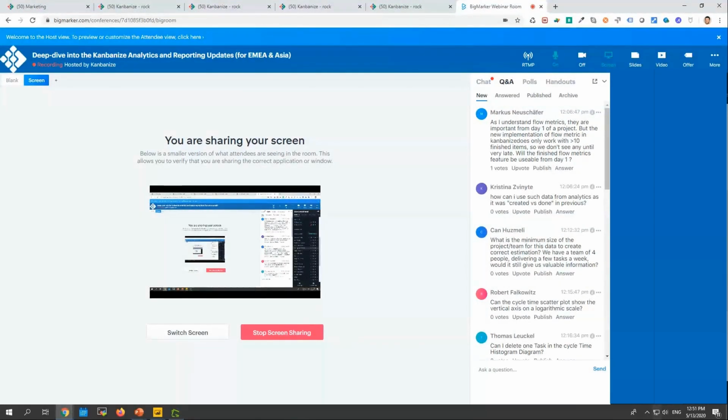If you create a new project in Kanbanize, our idea would be that you use a management workspace to plan the project. But this management workspace connects to team boards that are already a stable structure because the teams have presumably used them for some time now. So even though it's a new project, the teams working on the project already have historical data. We don't advise people to create new team boards for new projects, only new management boards for new projects, but still have the team board stable.